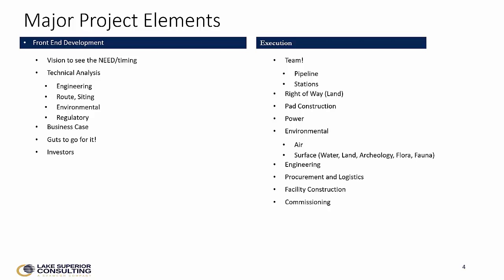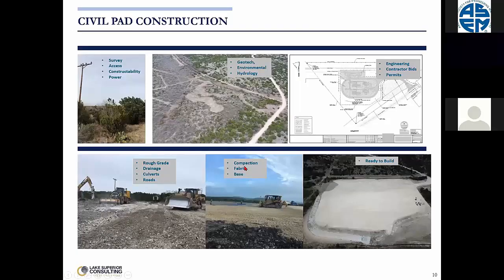There are a lot of aspects to it: first, we've got to get access to the land — we're going to lease the land, worry about driveways and roads getting in, manage that infrastructure in the future. We're going to worry about the civil side, utility power, the environmental side, engineering side, procurement and logistics, and construction. Commissioning is really the testing of the assets to make sure that they're going to perform the way that we had hoped.